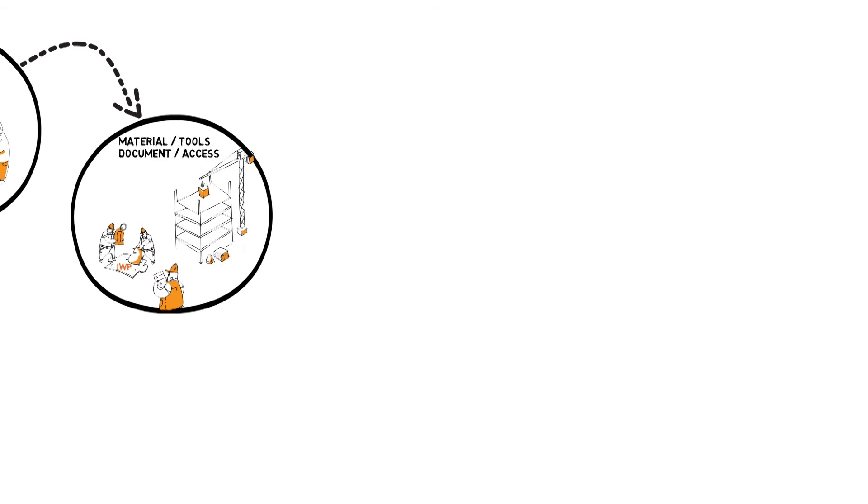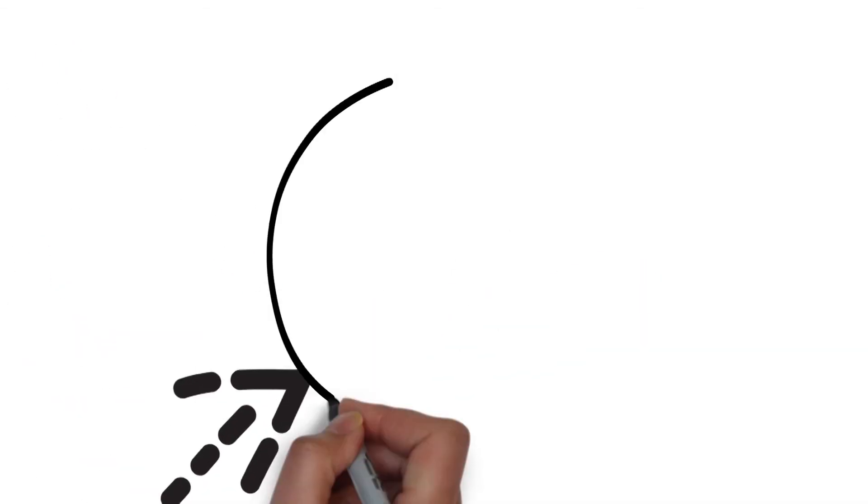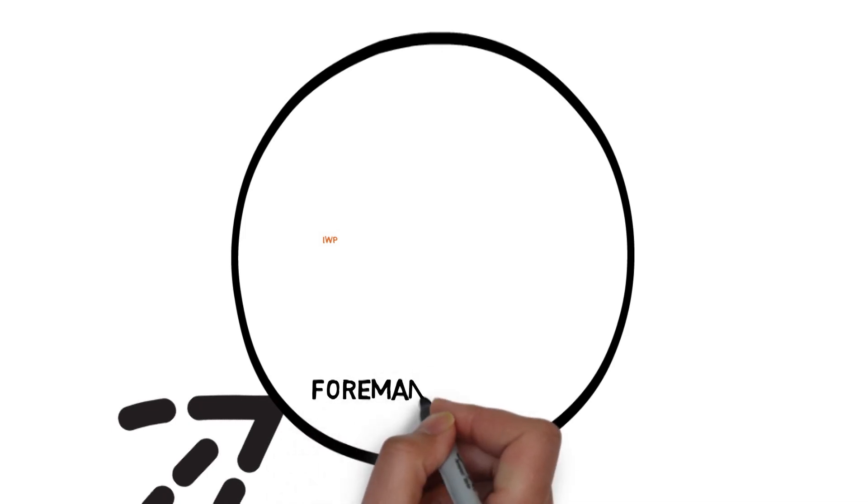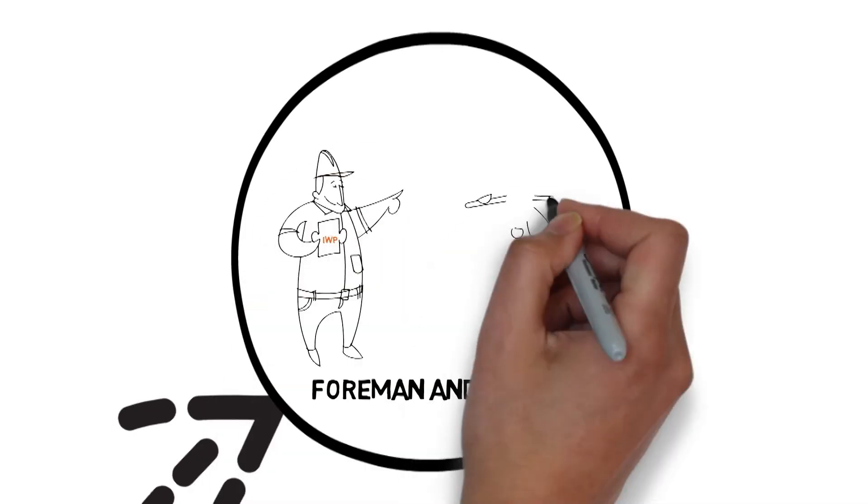Then finally, after all this preparation, we reach the objective. The IWP is issued to the foreman a couple of days before it is due to start, so that they can prepare to execute the work.